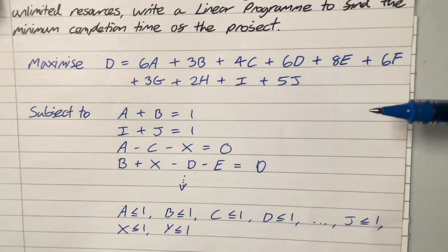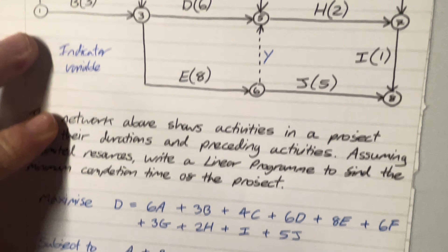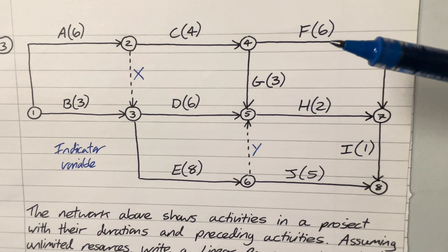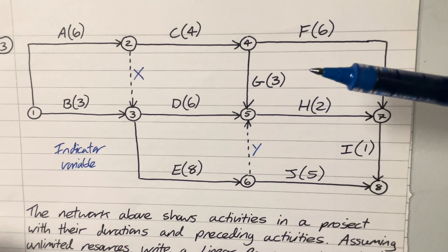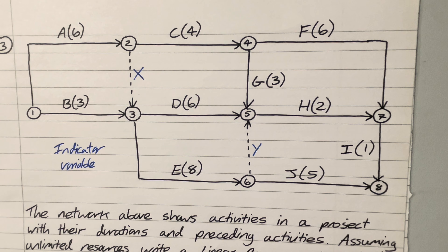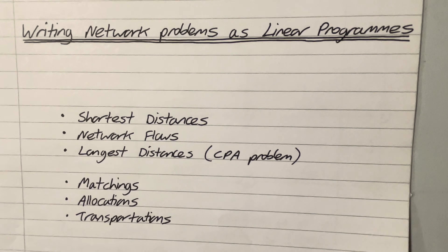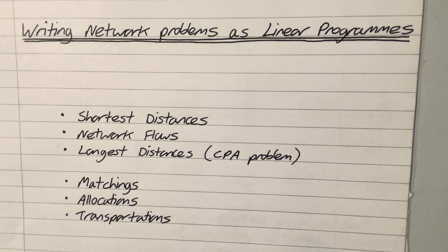The linear program finds the minimum completion time and which activities are critical to achieve it, but it doesn't necessarily find all critical activities if the critical path is non-unique. In my next video we'll look at three brand new problems — matchings, allocations, and transportations — which use bipartite graphs. Any questions, please pop them in the comments below. Hopefully this video was useful for your exam preparation.